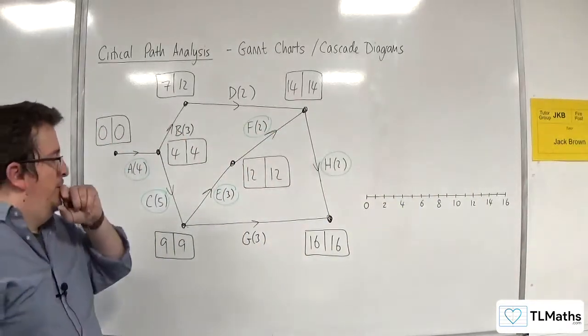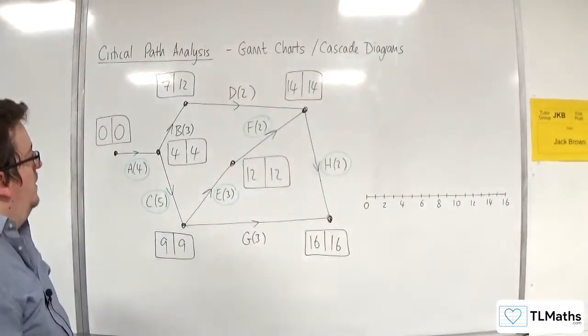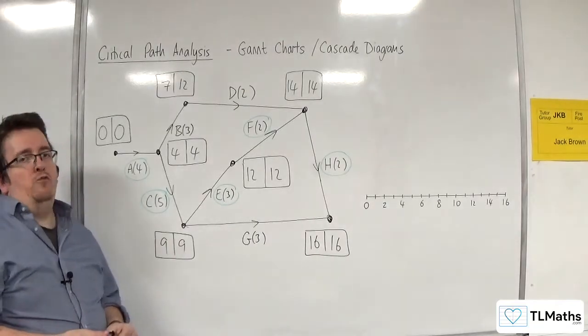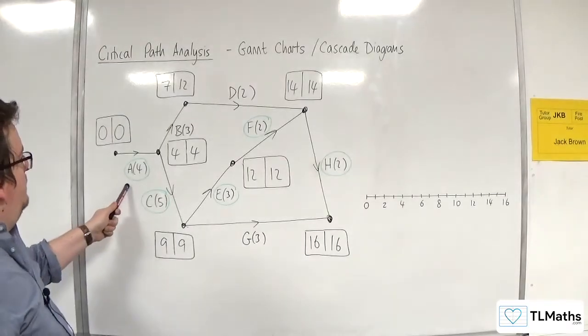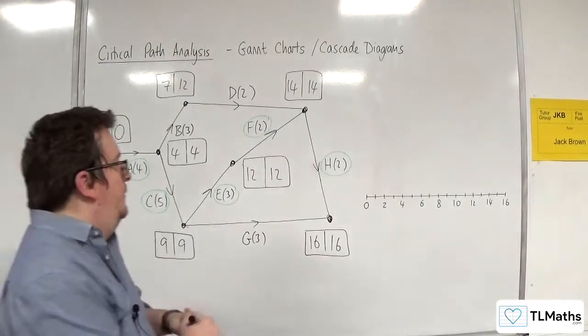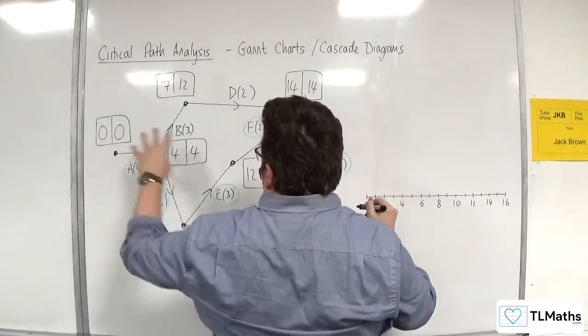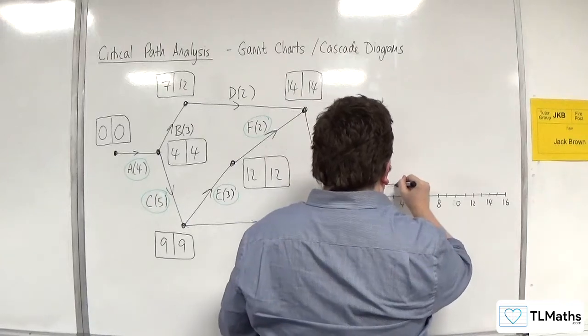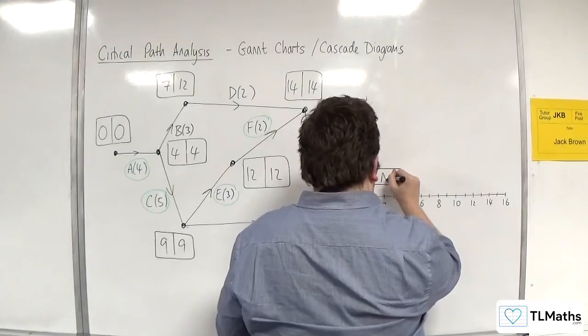Right, so we've got time along the horizontal axis. Each of your activities is going to be represented by a rectangle. Activity A lasts 4 hours, so it starts at 0 and goes on until 4. So it's going to look like that. Here is A.